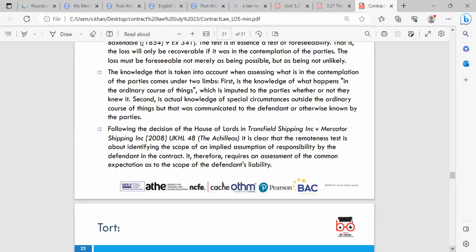It was held by the courts that the claimants could only recover losses which were in the reasonable contemplation of the parties, which include the loss of profit that could be expected from the lack of use of the boiler. But the claimant could not recover the loss of exceptionally lucrative contracts since the defendant was unaware of this contract.